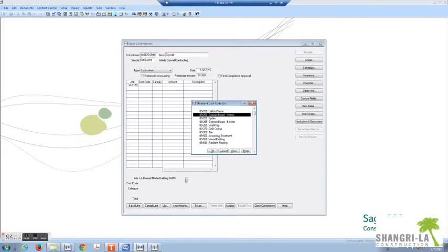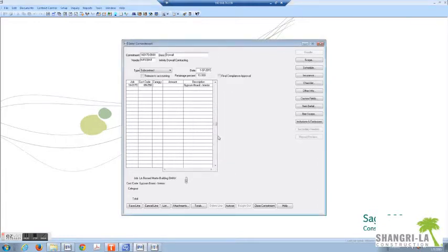In this case, 09250. Again, if on the first F4 list screen your cost code isn't there, that probably means that maybe an estimate hasn't been entered yet, which is a warning sign for you to say, hey, maybe I'm assigning this commitment to the wrong cost code. I want to know what the estimating department has assigned for this commitment. So in this case of 09250, under category, hit F4 again. You should only have subcontract as an option.